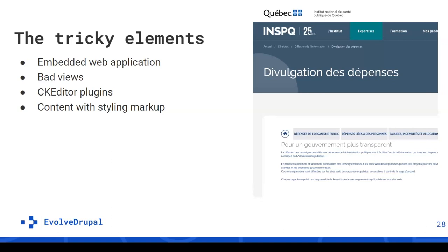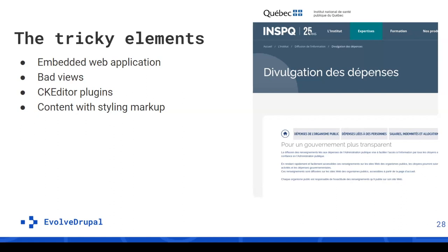The importance of discovery - this is going to be your big plan for the migration project. Don't skip this. Take the time you need. You're going to have less surprises along the road. The cleanup is really important - stuff you don't migrate means you don't have to deal with. There's a few things to think about like embedded web applications. As for bad views, there's a lot of projects that create views per taxonomy terms instead of thinking of a more general view. CK Editor plugins - if you have custom plugins you're going to have to think about it. Content with styling markup is one of the big issues. You can clean up your content as well when migrating.